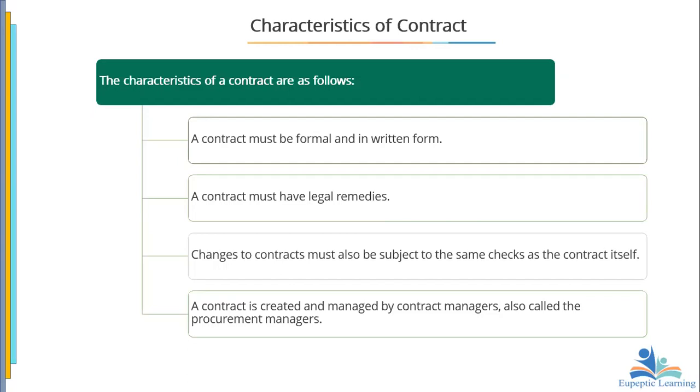Otherwise, if you do not complain about it, and for 2, 3, 4 consecutive times the person changed the payment options but you didn't complain, it is taken that you accepted the new change. So anytime there are litigation issues, they can tell you in court that, look, the moment the payment plan changed, you should have gone back and referred to the contract, that this is not how we said it. If we are going to make changes, then we need to do the right thing.